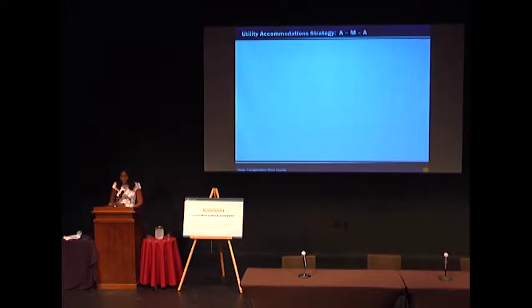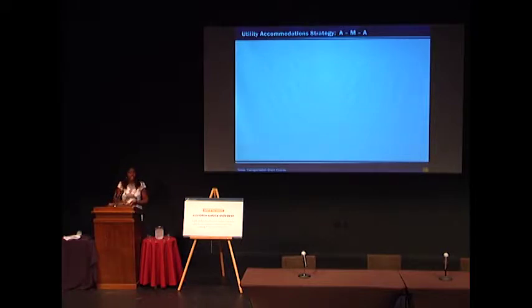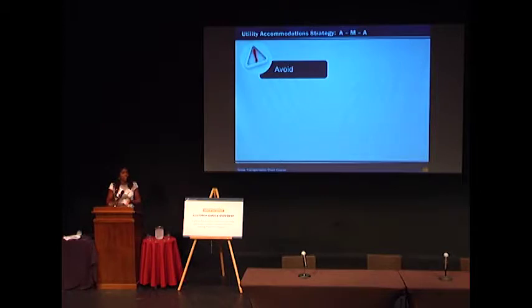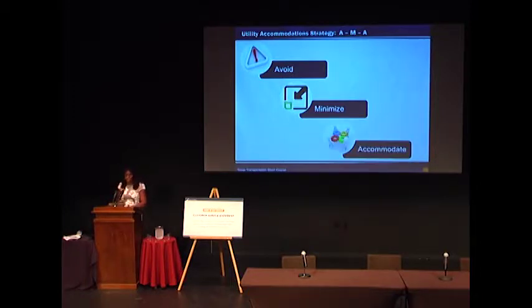I'd first like to talk about the utility accommodation strategies that we are focusing on in the ROW 100 course — that's identifying and managing utility conflicts, taught in partnership with TTI. Cesar Carroga is the instructor. A part of the accommodation strategy is for us to prioritize how we consider dealing with utilities. The first priority is to try and avoid utility conflicts if at all possible. In instances where we can't avoid conflicts, we then want to minimize any impacts. And once we've tried to avoid and minimize, the last resort is to accommodate those impacted utilities.